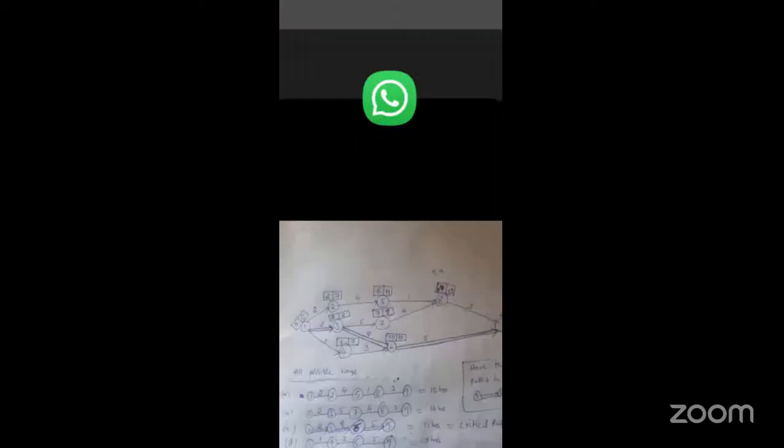Next, 8 to 9, and don't fill this 9 because it is already finished, 15, 15. Next, coming to the remaining activities. The event 7, coming from 1 to 3, 3 to 5, 3 to 7. 3 to 7 means it has already completed 2 hours at 3. If you come 3 to 7, we need to spend 5 extra hours. So 2 plus 5, 7 hours. So for event 7, 7 is the earliest starting time.